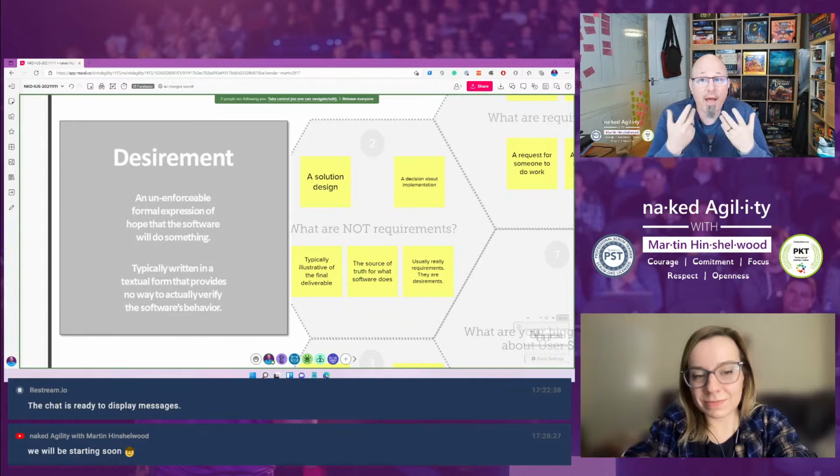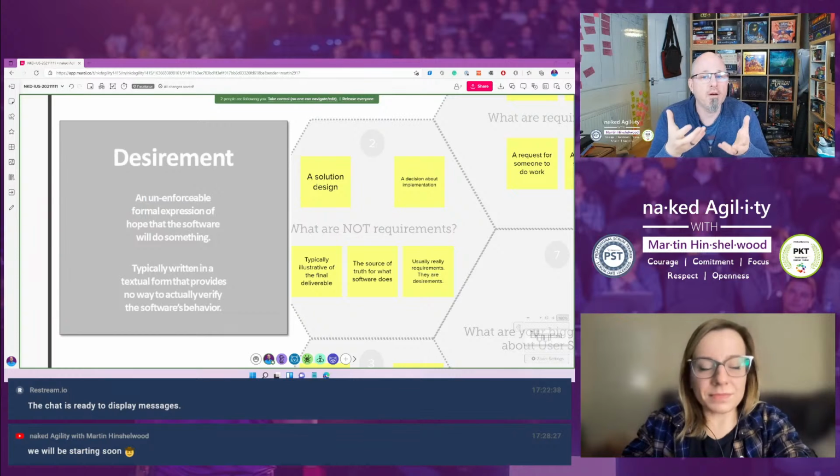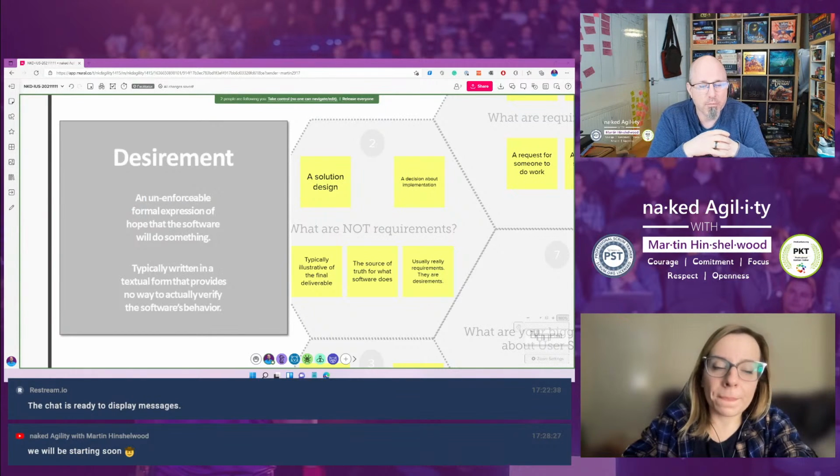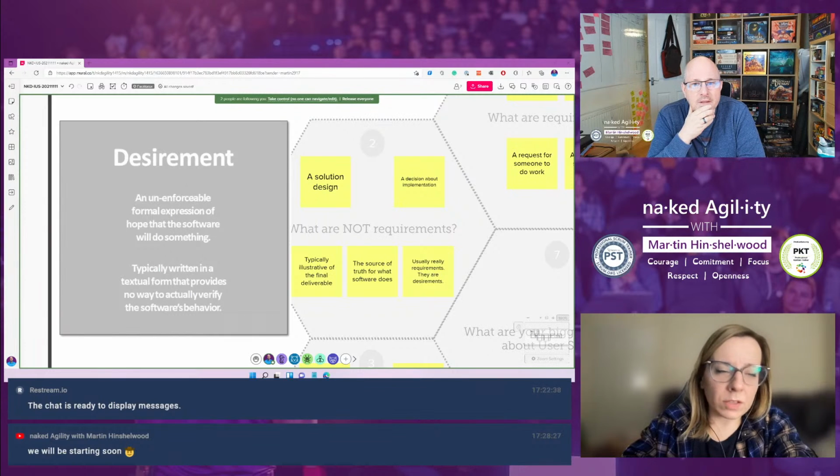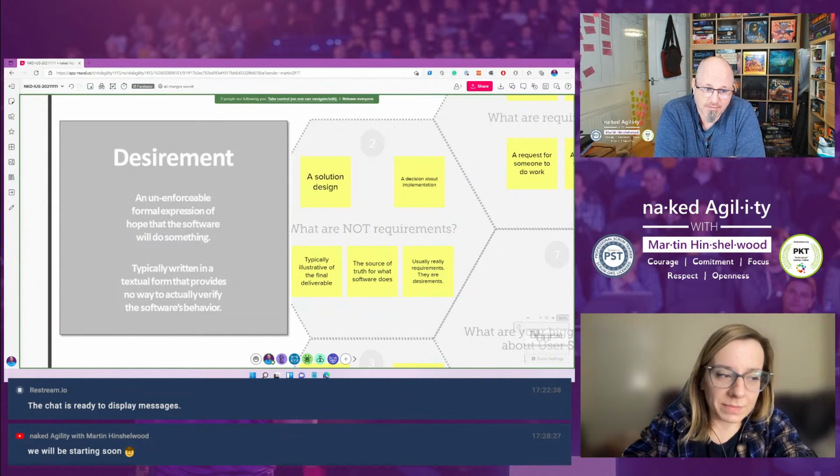When I do exercises with teams on breaking down backlog items, I'm looking at what they're creating, and if there's more than 4 acceptance criteria, I might give them a poke and say, should this be 2 things? Depends on the estimation with story points. If it's bigger than 8, then yeah, you should consider making 2, if you're doing story points.